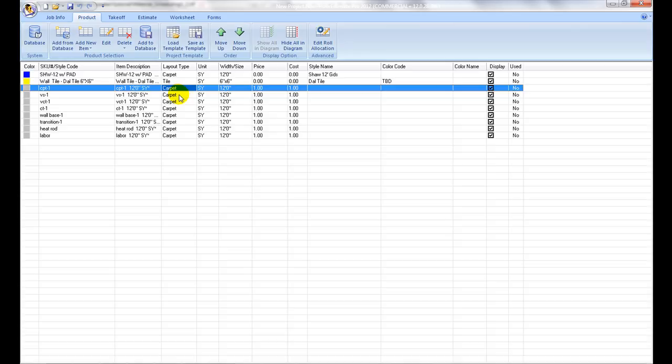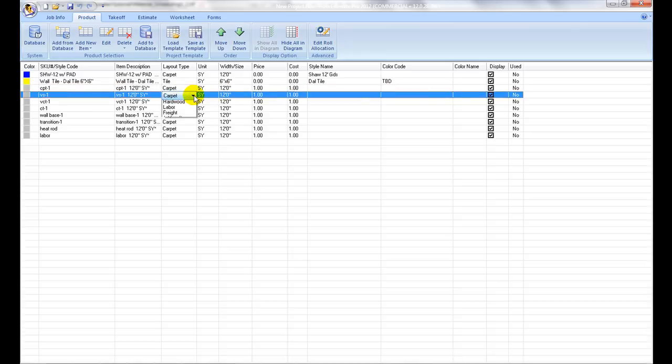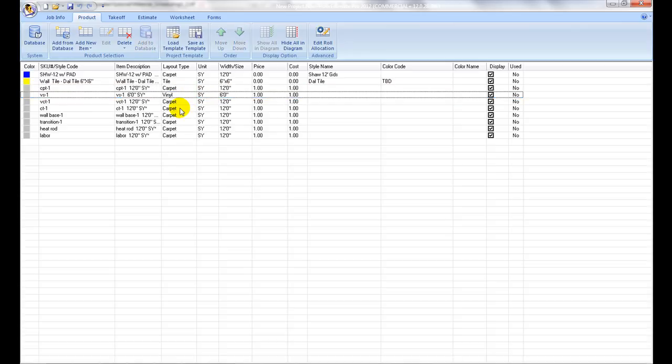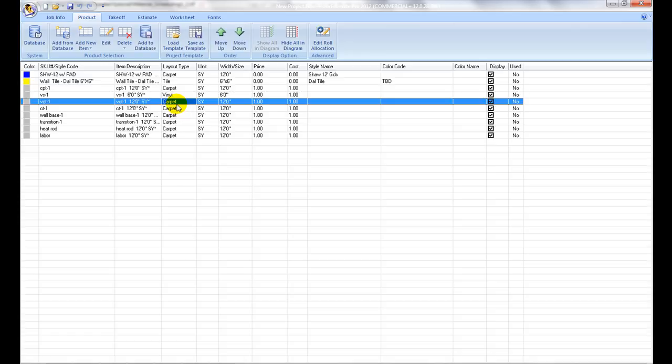For regular roll sheet goods such as carpet, sheet vinyl, select carpet or vinyl respectively. Square shaped products such as carpet tile, vinyl tile, and ceramic tile set the layout type as tile instead.